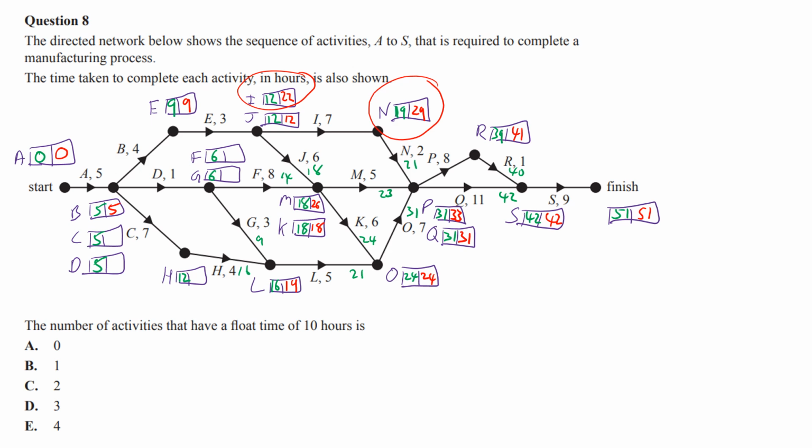Now, where were we? So 20, we had down the bottom here, 24, that was a 19. So 19 minus 9 is 16. That looks like we got another 10 there. And then for the F, it is going to be the lowest number at that point, which actually is the 18. 18 minus 8 is 10. Then we choose the 10 minus 1, which gives us 9 for D. This is a horribly big diagram.